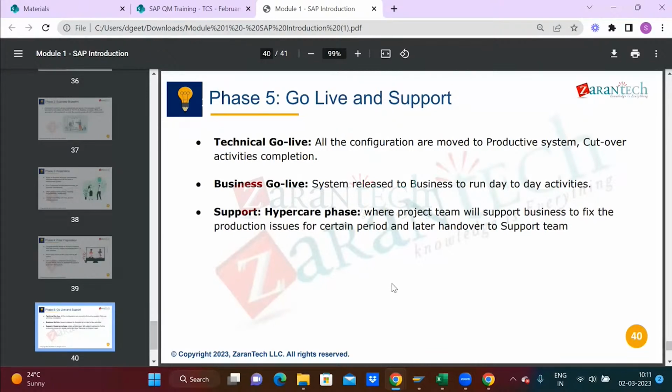Agile is not about getting the complete requirements first. If you are going with agile, you will collect like 50-60% of the requirements and start with the project or development. During the development phase, the additional requirements will come in, because we are not waiting for 100% of the requirements to be collected. So at least 70% of the requirement is there, and we say, let's start the development, let's start building a form first. During the development phase, in parallel, the discussions will happen, and whatever requirements come in, we add to that development.